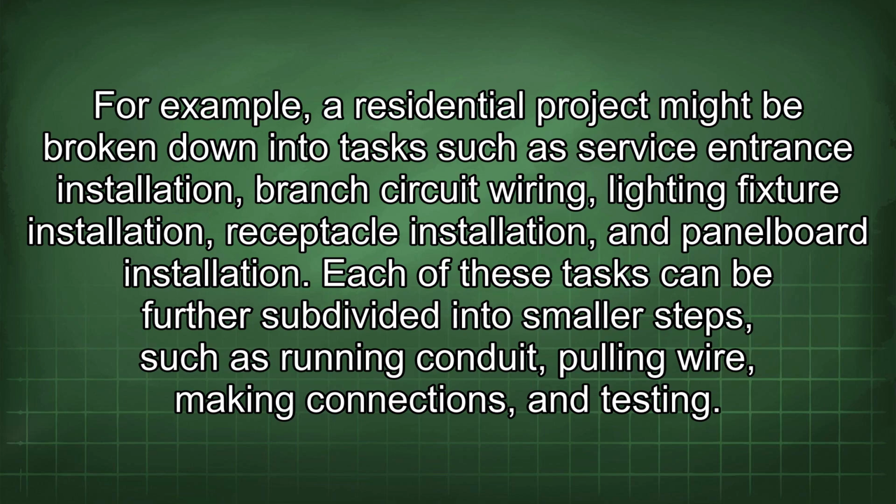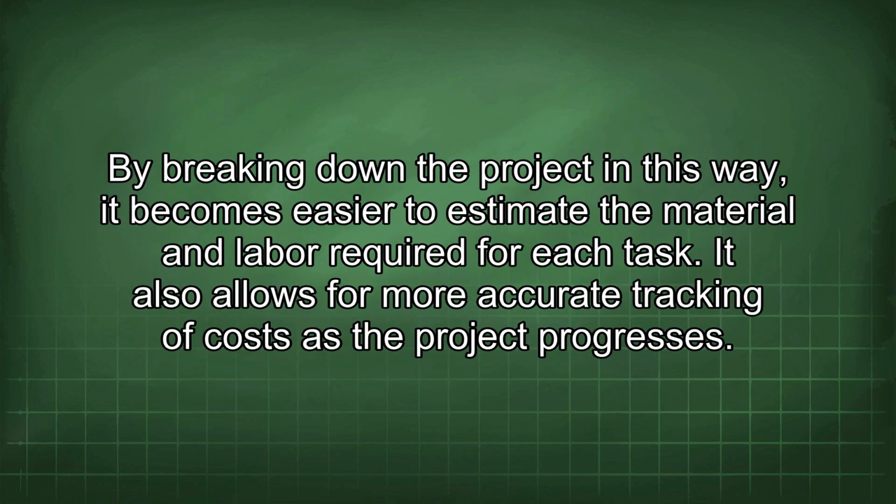Each of these tasks can be further subdivided into smaller steps such as running conduit, pulling wire, making connections, and testing. By breaking down the project in this way, it becomes easier to estimate the material and labor required for each task. It also allows for more accurate tracking of costs as the project progresses.